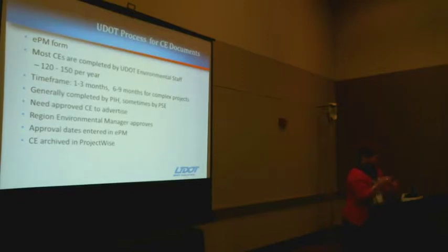That's the absolute drop-dead date. So at the very latest, when we submit for advertising, when the region submits it to the complex, is when you absolutely have to have a CE completed. And they're approved by the region environmental manager at the region level.